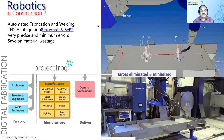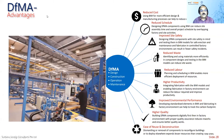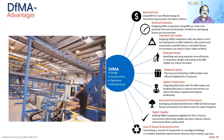We can also think of robotics in construction. For projects like bridges with a lot of welding, robots can read our drawings and models directly and fabricate for us, just like in car manufacturing. The BCA highlights the advantages of DFMA: reduced cost and schedule since everything is made in a controlled factory environment, improved site safety with fewer workers, reduced waste, higher productivity, improved environmental performance, higher quality, and even the possibility of deconstruction — building in a modular way so after its lifespan the building can be deconstructed and relocated.